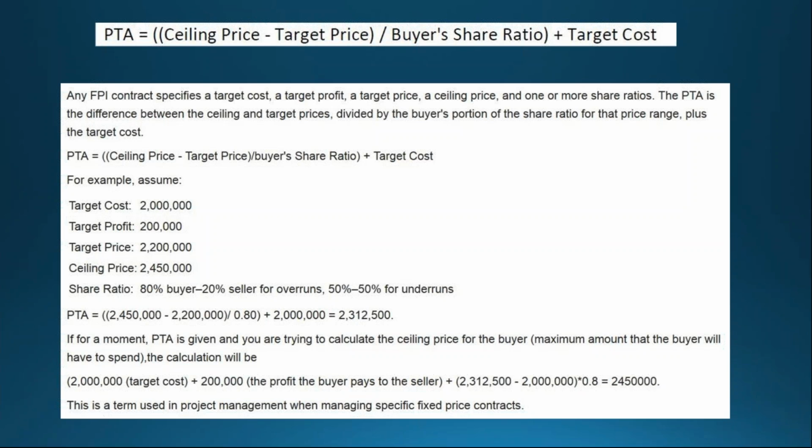Contractor. So what I'm saying is that up to this point here, we've overrun the contract by $112,000, okay? We've picked up, as the vendor, 80% of that, which was about $90,000 we paid in the overruns. We're not going to pay any more overruns now. The vendor has also paid in about $22,000, $22,500 of his own money.